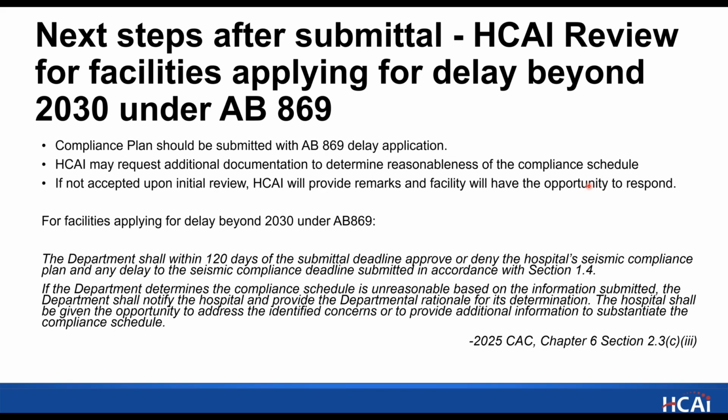So when you are preparing the compliance plan and the delay at the same time, we'd like to see the sequence of seismic compliance scope and how it basically takes you to that extra time. So we might ask for additional documentation for the extension. And again, as always, if we remark it, it's going to be in writing, and the facility will always have an opportunity to respond.